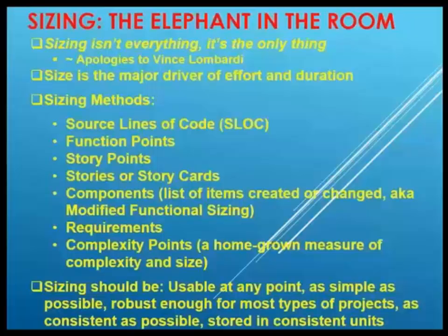Story points, or stories, or story cards, may be very accurate within a project team, but may not be so consistent outside of teams. In my organization, stories are fairly consistent across the board, but story points are not. And that may or may not be the same case at other organizations.